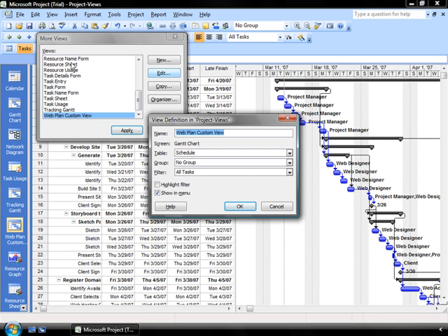It's very important to just use that edit capability on your custom views. Don't edit a standard view within Project because it will adjust the base view and it will be only usable to you. If you go and share that particular project with another individual, another project manager, and you've adjusted the base view, that will skew what they are understanding and analyzing from the project view. So it's a good habit, a best practice to get into creating your own custom views and working from them as you're working within your project, and not to adjust the base views that come with the application.